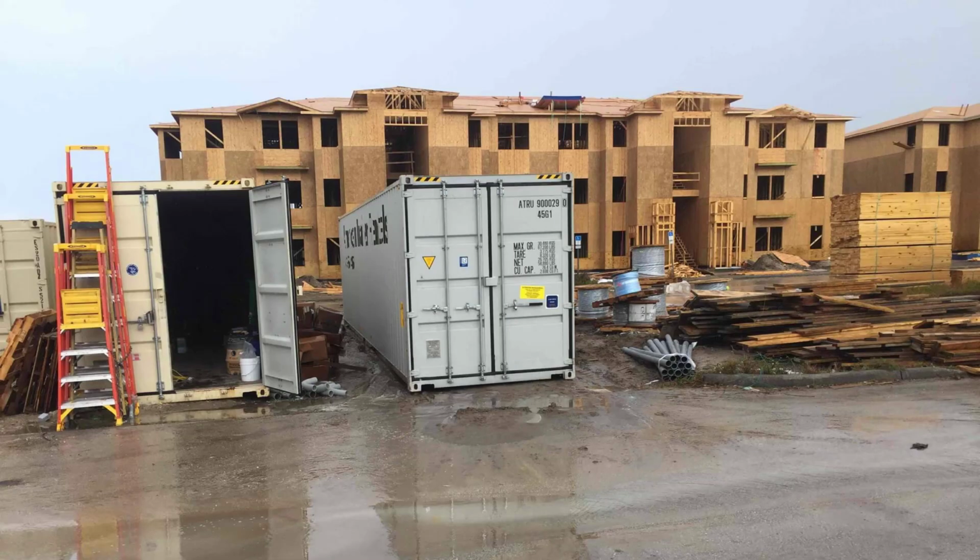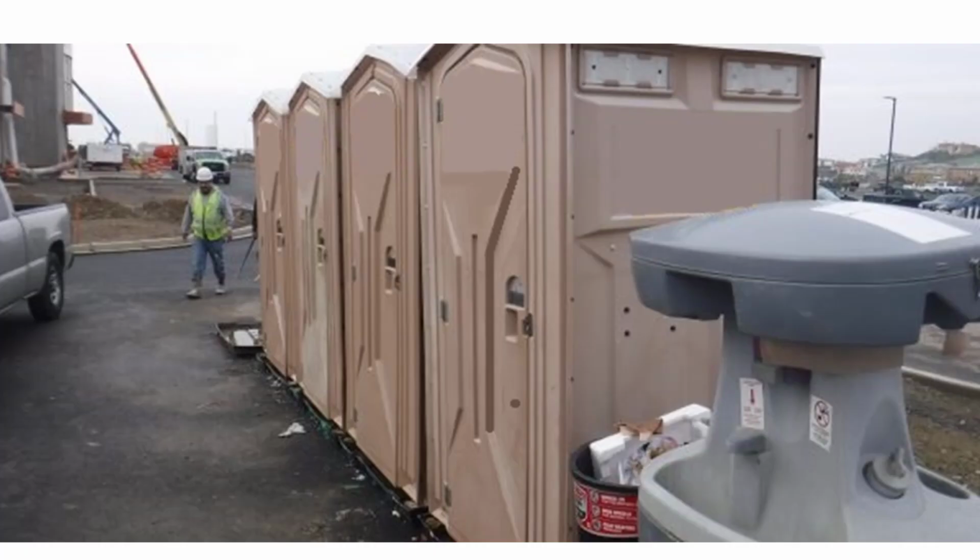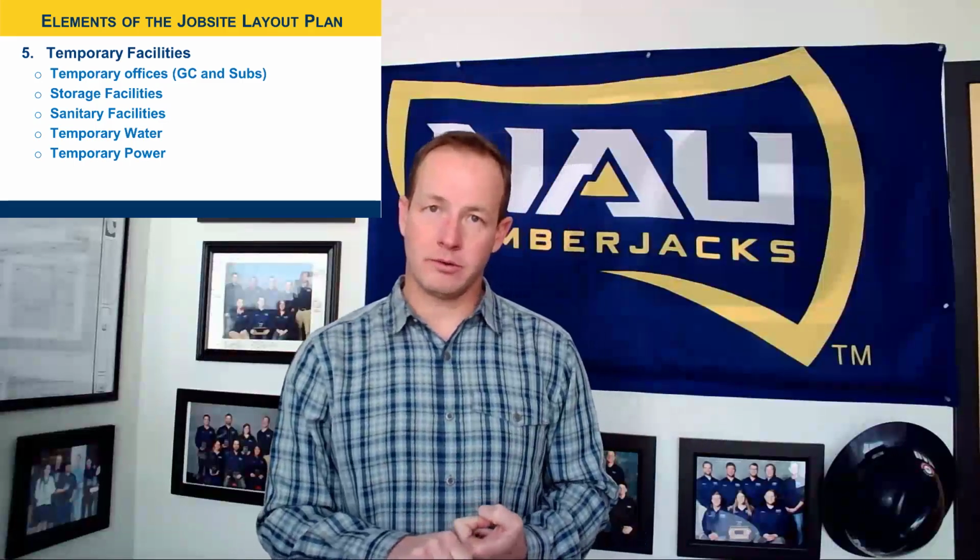Will our subcontractors actually need job site offices? Will we need to provide them space to put their job site offices? And then storage facilities. Do we need any temporary storage facilities? Our sanitary facilities. And then we need to look at our job site and figure out where can we get temporary water from?